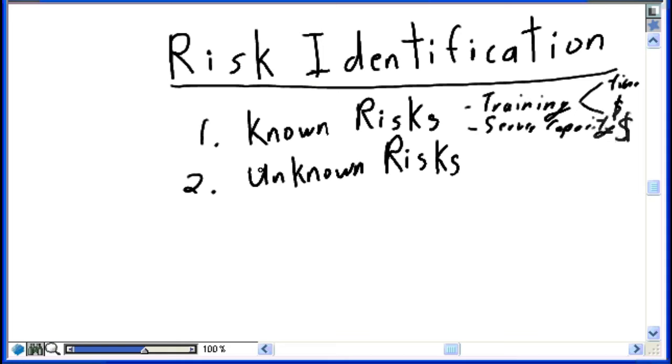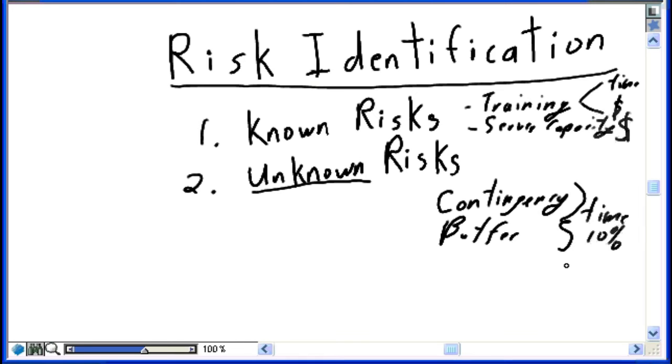Unknown risks are unknown. You can't specifically say there is a training risk or there is a technology risk. Unknown risks is simply an allocation of additional time, additional funds to your project to cover all of the unknowns. So unlike training and server capacity, where you can allocate specific time and specific dollars to specific circumstances, unknowns requires a general contingency. Unknown risk requires a general buffer. So you need to allocate time, maybe 10%. You need to allocate specific dollars, $5,000, to deal with the unknowns associated with project delivery. Unknown risks need to be managed very differently than known risks, and we'll cover that in the next nugget.